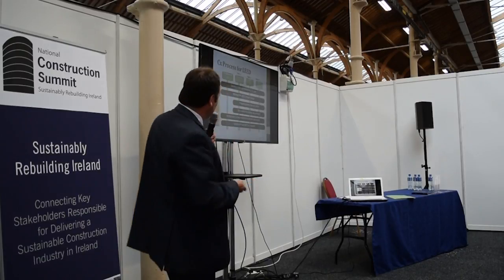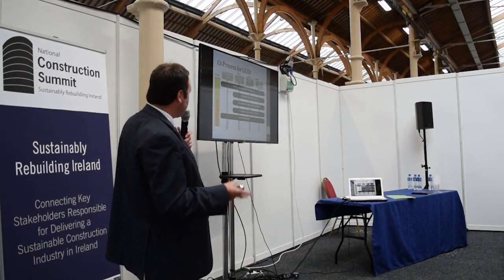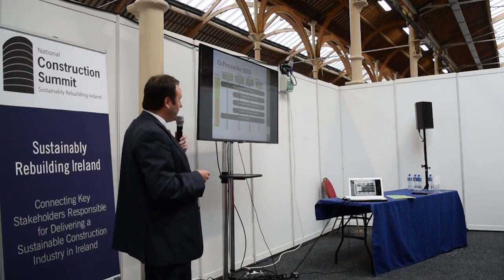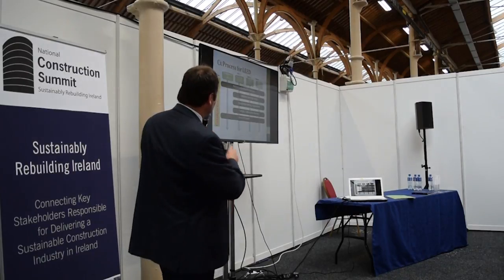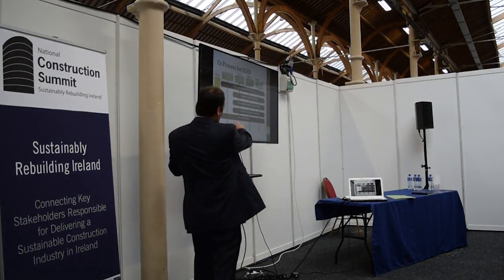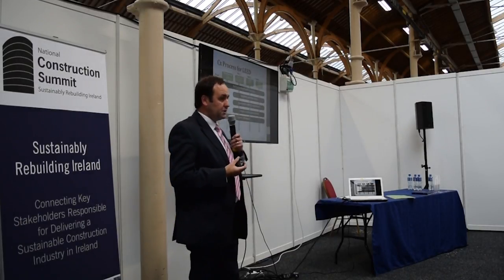So again, the OPR and the BOD are continuously updated in this live process. As you progress then through construction, there's pre-functional inspections, which are carried out on site. And again, that's for fundamental and enhanced. And if you're going for enhanced, that's where there's technical reviews of all the submittals that come in.